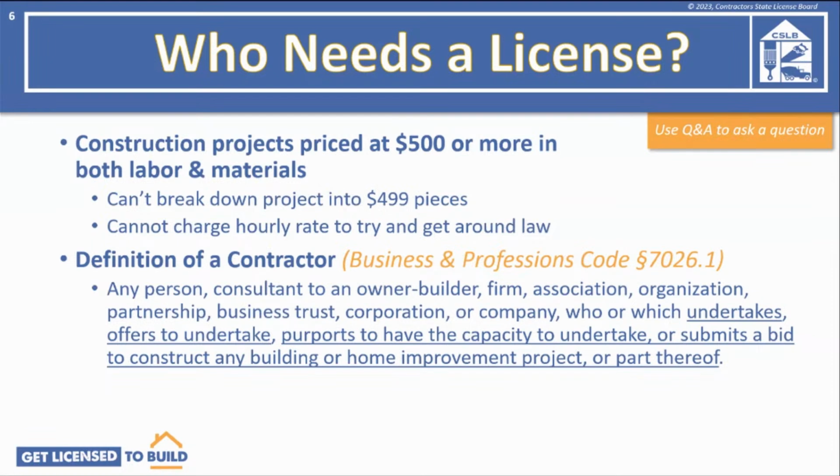Here in California, a state contractor's license is needed for all construction projects priced at $500 or more. That total includes both labor and materials, no matter who purchases the materials. The law doesn't let you break down a project into $499 pieces. It is the entire project. Also, you can't charge an hourly rate to get around the $500 threshold. If the hourly cost times the number of hours for the job totals $500 or more, you need a contractor's license.